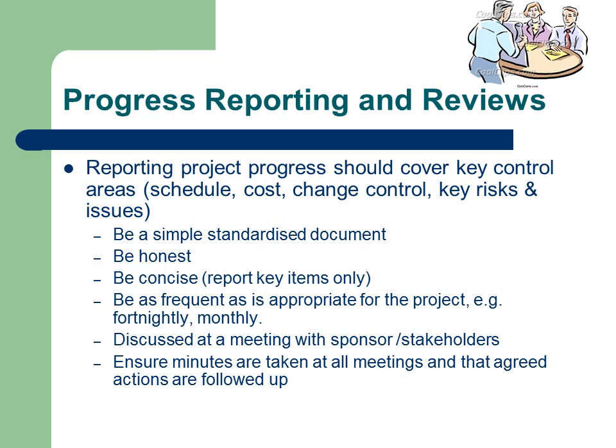The project manager should also provide a summarized report to the project sponsor or steering committee. A progress or status report should be concise and above all honest. Your key stakeholders don't want a blow-by-blow description of your project, but they do want an honest summary of your progress, your successes, as well as any major problems you may be experiencing. They'll want to know if you're on schedule and whether your expenditure is according to budget. Please refer to the status report template, which is provided in your set of course templates.